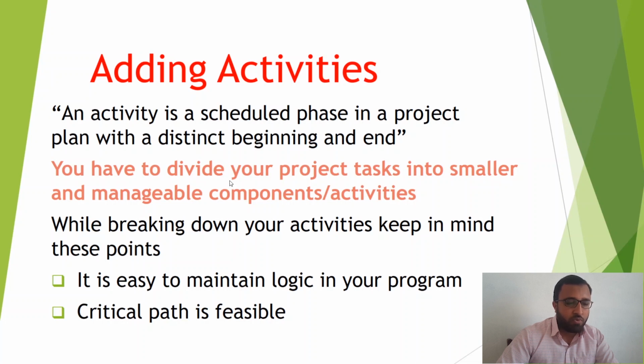You have to divide your project tasks into smaller and manageable components, activities. While breaking down your activities, keep in mind these points. It is easy to maintain logic in your program. Critical path is feasible. You should not divide into too much detailed activities, because later on the monitoring and tracking becomes difficult.